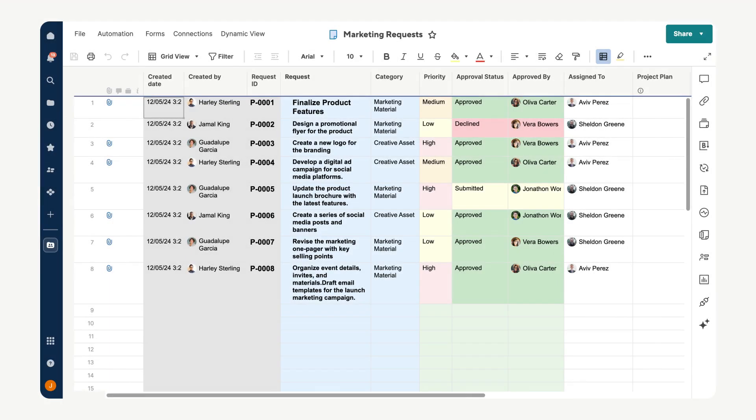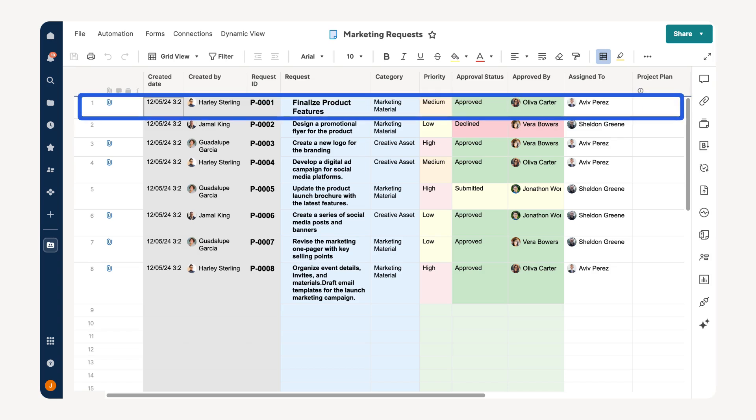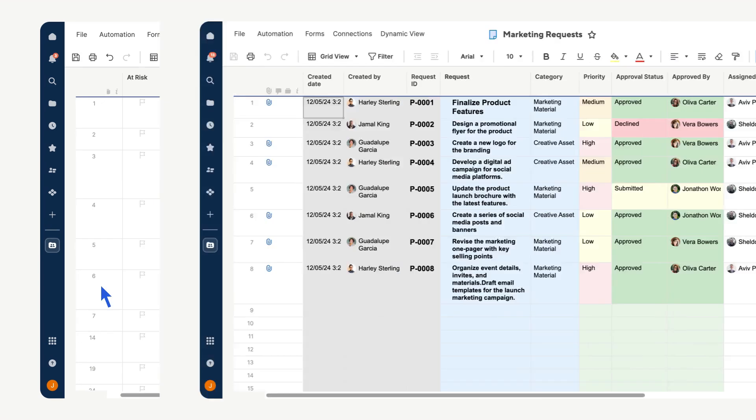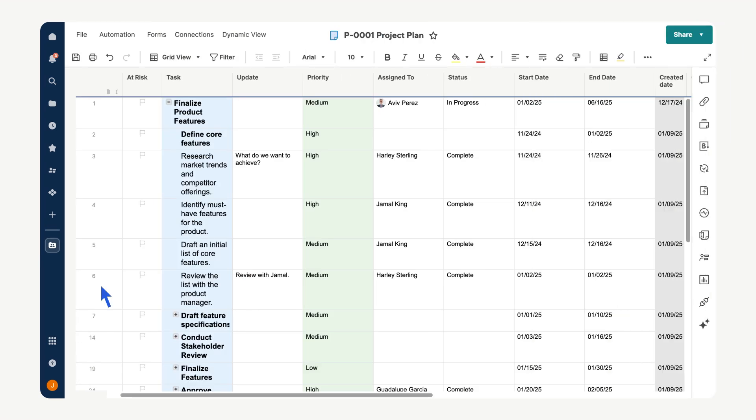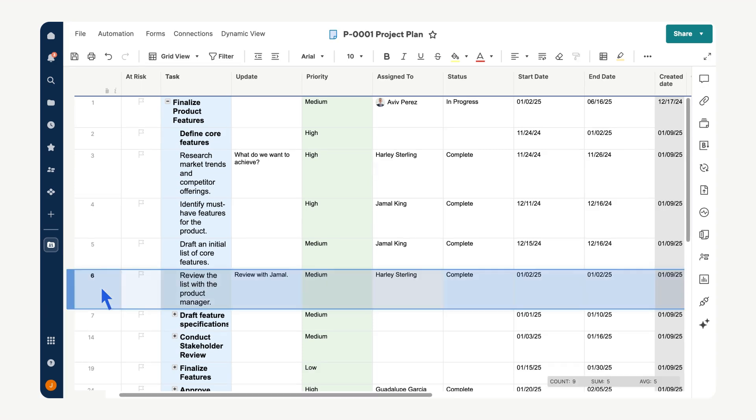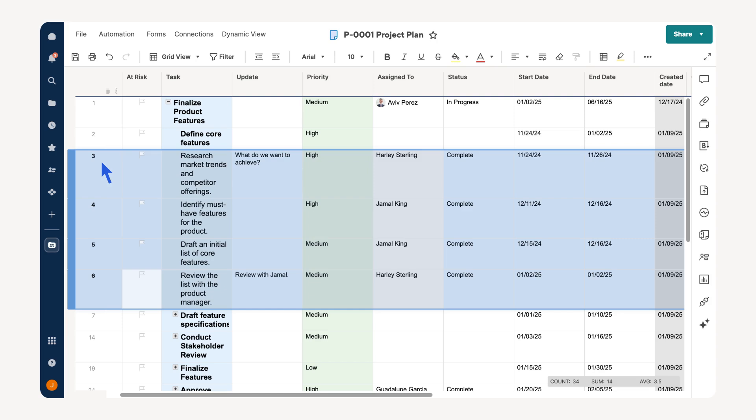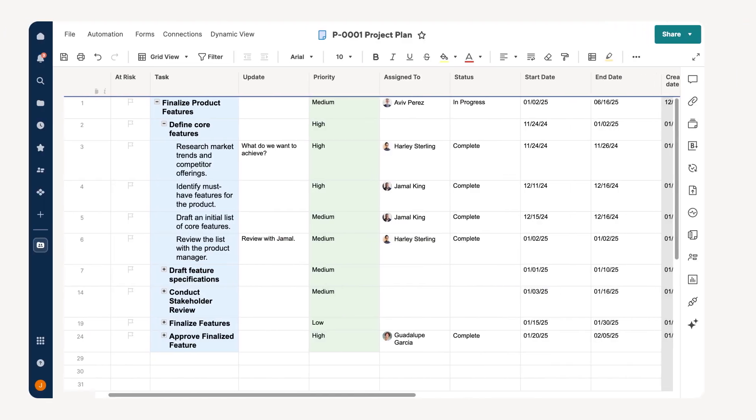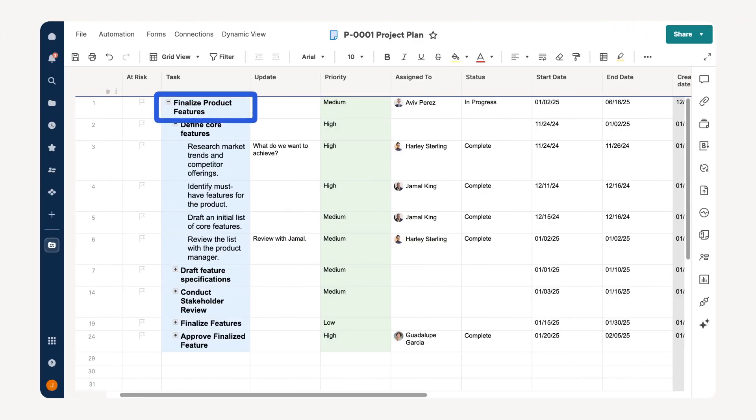We're starting with our intake sheet where requests have been submitted and reviewed. First, locate an approved request and identify the key details. Then use this information to create a project plan in the project sheet. Input the request details into appropriate rows, adding additional rows for subtasks as needed. Use the hierarchy feature to organize your plan into collapsible phases by indenting subtasks under their parent tasks for clarity. Designate the top level row as the project name or summary so that it represents the entire project at a glance.